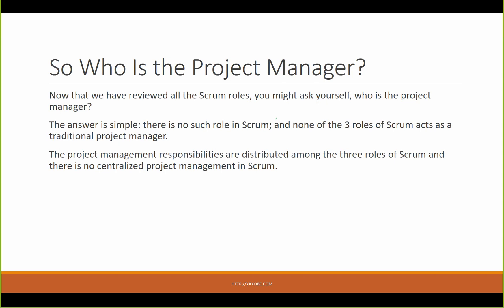Who is the project manager in Scrum? In Scrum, everybody has three roles: the Product Owner, the Scrum Master, and the Development Team. The Scrum Master is not simply 'the project manager.' The project management responsibilities are distributed among these three roles of Scrum. There is no centralized project management in Scrum.